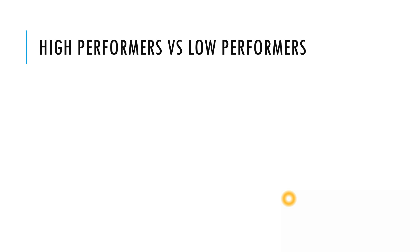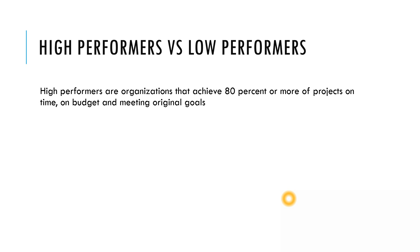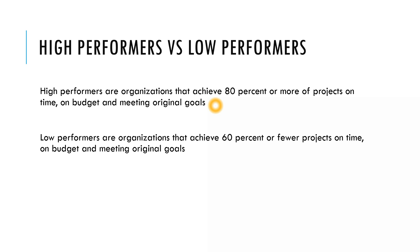To understand the graph listing these factors, it's important to know what high performers are. That yellow circle was my mouse pointer. High performers are organizations that achieve 80% or more of projects on time, on budget, and meeting original goals. If an organization has a success rate of 80% or more, it is considered a high performing organization as defined in this report.